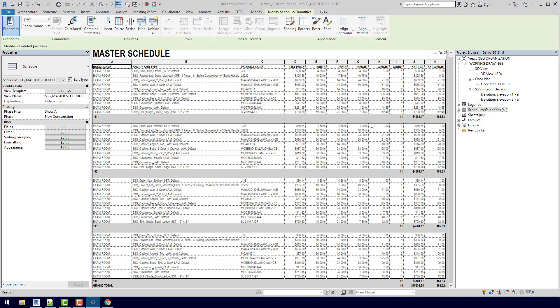So since we put the same model group in every single room, we can see that we're getting the same price in each room, and then if we go down to the bottom, it actually is totaling up all of our rooms. Just by adding those model groups and loading in the schedule, now we already have a budget for all of our casework for our exam rooms.